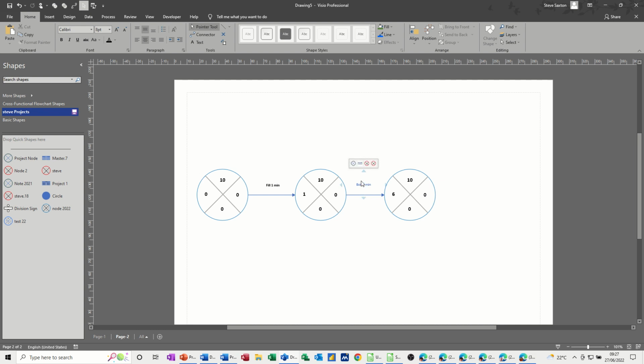But now, while it's boiling, this is where you can have other things going on. So I want a shape to come out of this shape and then reconnect back into there. I haven't numbered these, so this needs to be 20. And then I'll just drag another shape on. Push it up there a bit. Connect it up. It just connects straight up. And I want it to come straight down back into there, and this one needs to be a dotted line because it has no time.